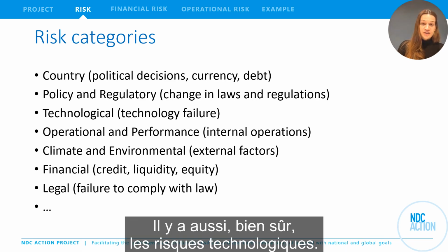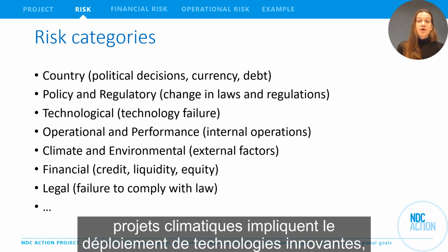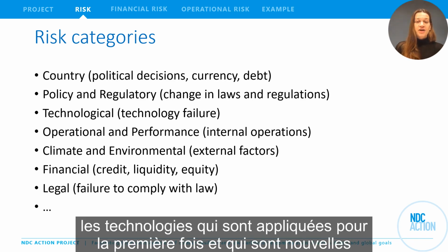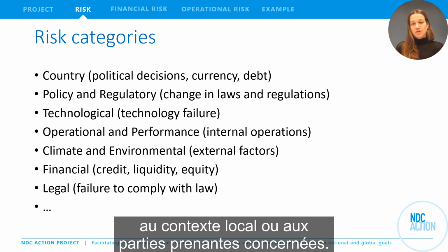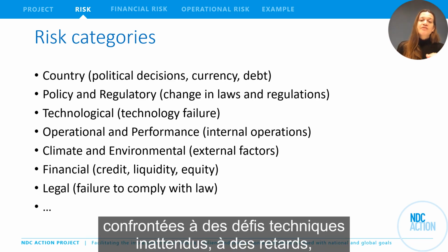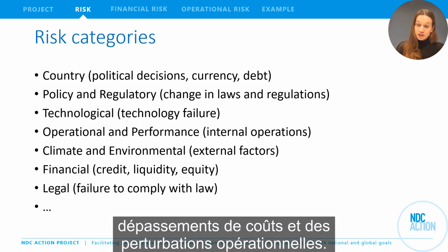Then there's, of course, technology risks, as we mentioned. Many climate projects involve the deployment of innovative and sometimes in-country unproven technologies that are applied for the first time, that are new to the local context or the relevant stakeholders. The perceived risk, especially from financial stakeholders, is that these technologies may face unexpected technical challenges, delays, or even failures, leading to cost overruns and operational disruptions.